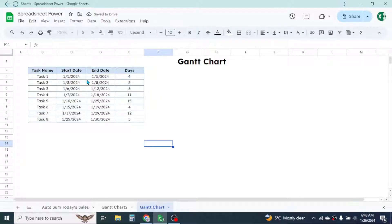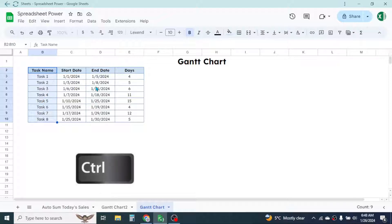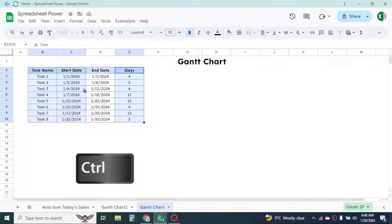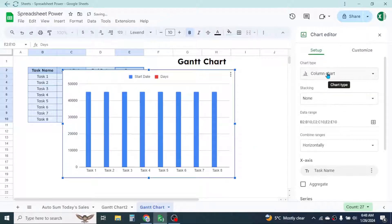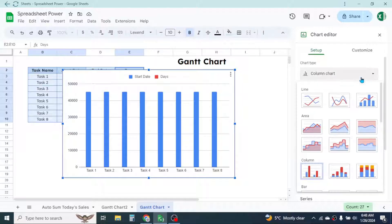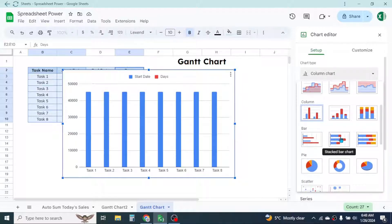After calculating the days, select the task name column, then hold the Control key on the keyboard and also select the start date and days taken columns — these three columns only. Then go to the Insert tab, click on Chart. In the chart editor, we need to change the column chart to a stacked bar chart, so go to the dropdown and select the stacked bar chart.